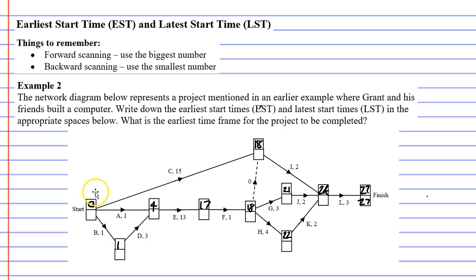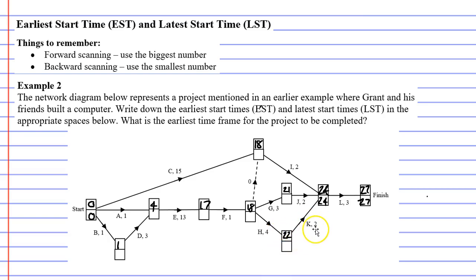If we look at our start vertex, it also has the same earliest and latest start time, so we can fill that in now with zero. Moving back to the previous vertex, activity L takes three minutes to complete, so it needs to start at least three minutes before completion. We write down 24, because 27 minus 3 gives us 24. Activity K takes two minutes — 24 minus 2 gives us 22. Activity K cannot start any later than 22 minutes into the project, otherwise we'll delay the entire project.